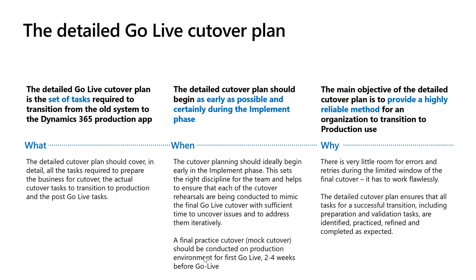You really want to exercise your cutover plan prior to user acceptance testing, because that's a very good test of your mock cutover. And when you go through user acceptance testing, you can say that the results of the user acceptance testing are very valid because this is exactly the process that we're going to adopt for our go live cutover, right? If you've got big differences between what you did to get data over for UAT as opposed to what you're going to do for go live, you're reducing the meaning of UAT. You can't extrapolate so easily now because you're doing something different, right?